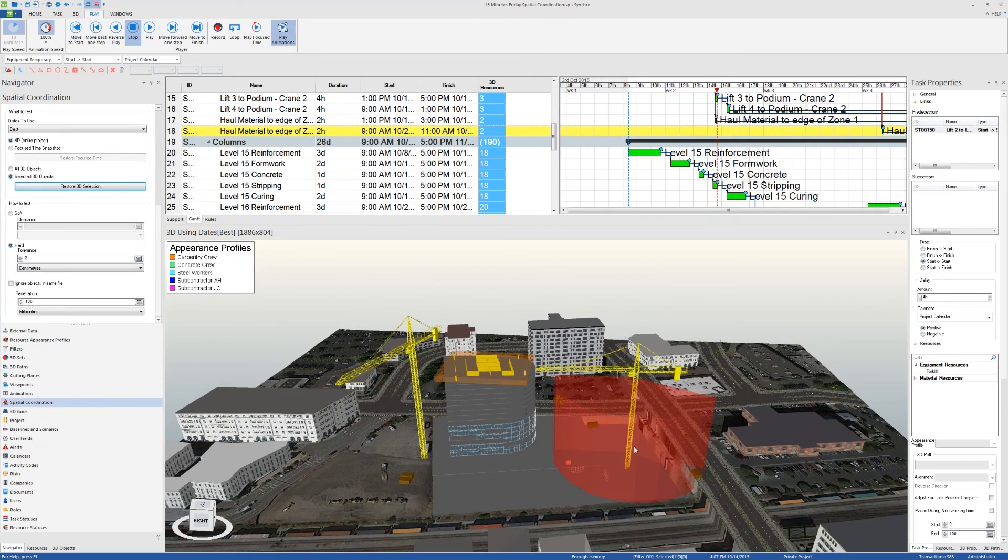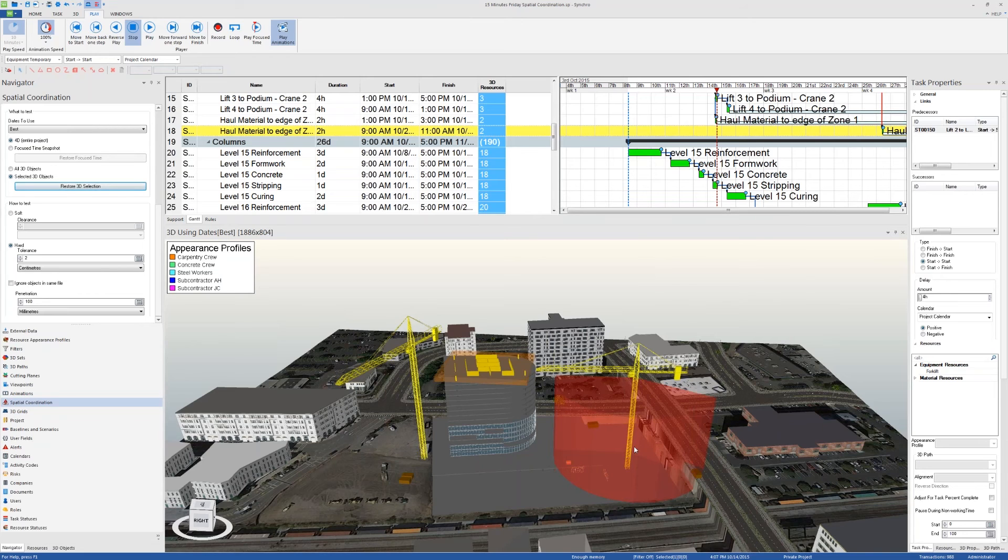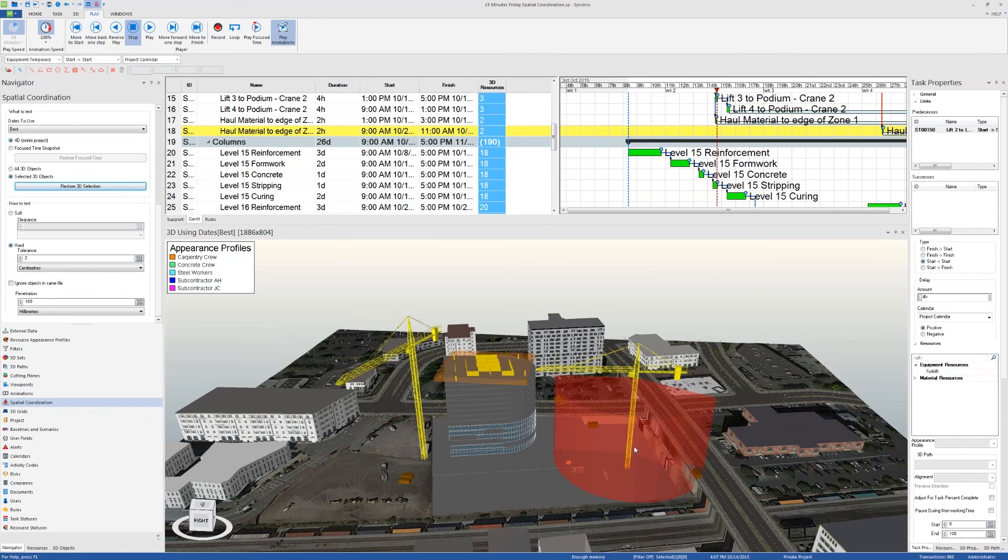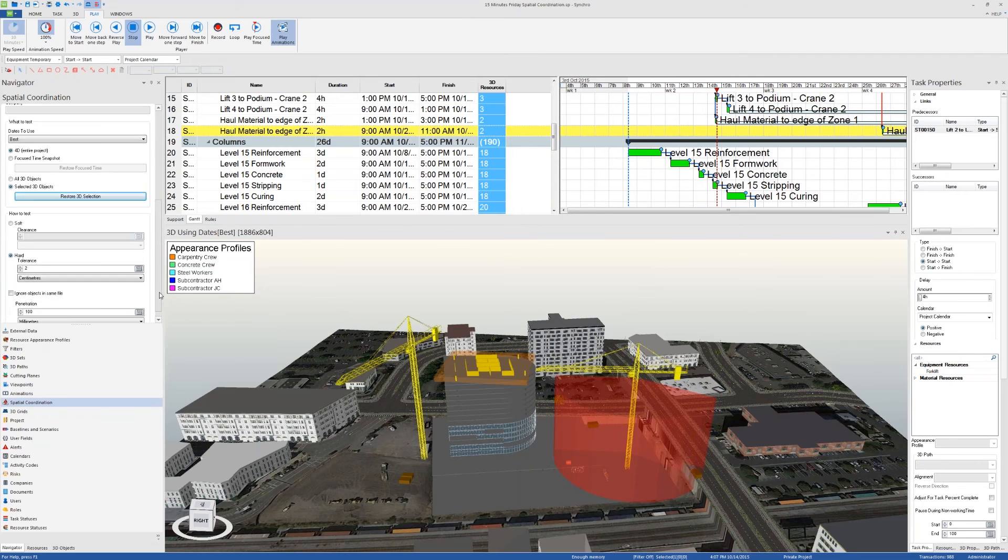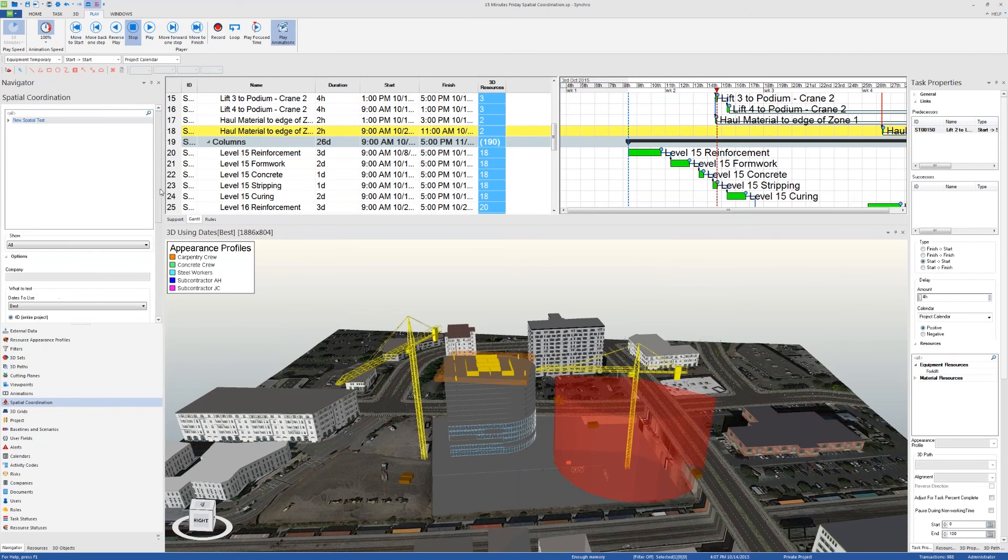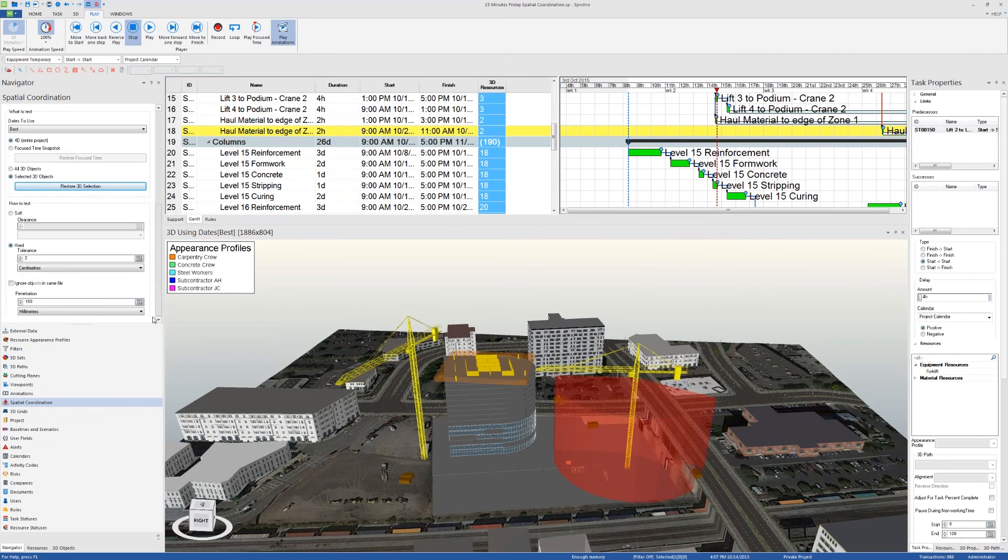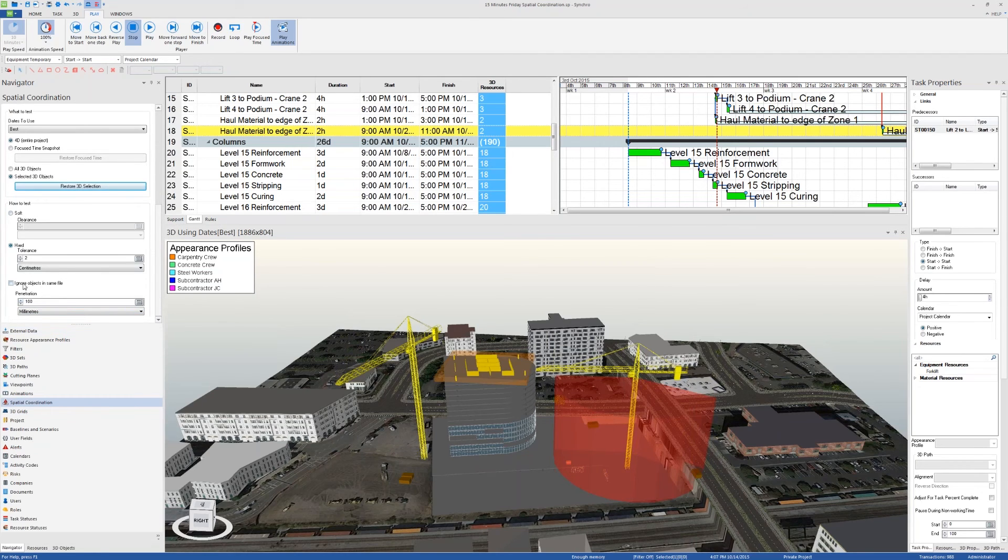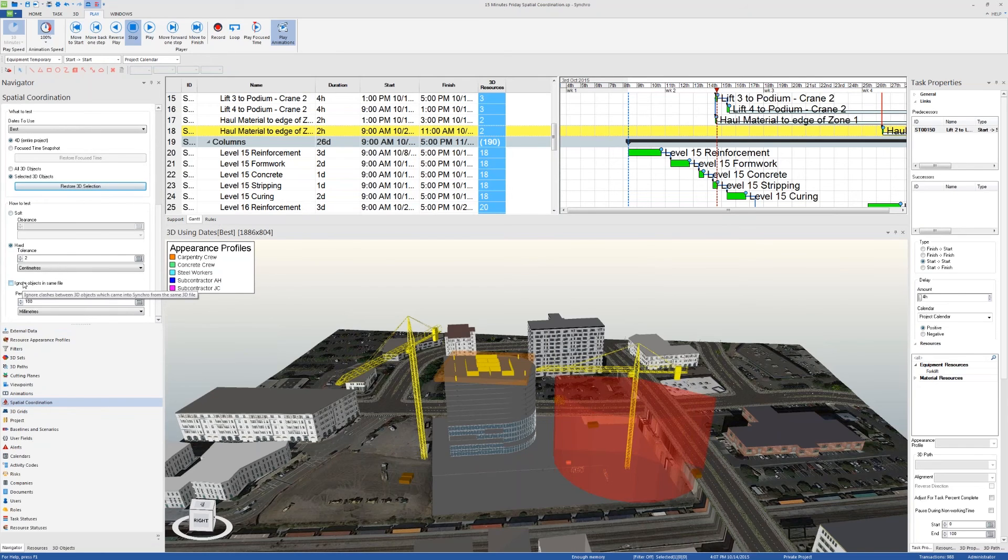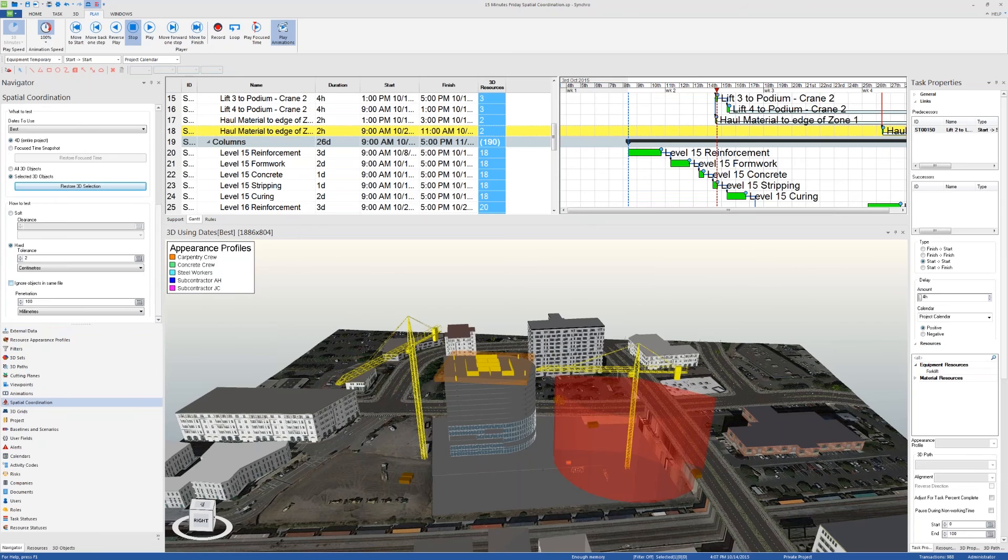Okay, terrific. Another question: Can we create a rule set to customize clash detection? I'm not sure what this means, but here are the options that you can use for a 3D path. We went over soft, hard, and penetration. There's also ignore objects in the same 3D file. So if you don't want to detect too many clashes where you'll be overwhelmed and miss the important ones, you can check this option which will ignore clashes that come from the same input import source.